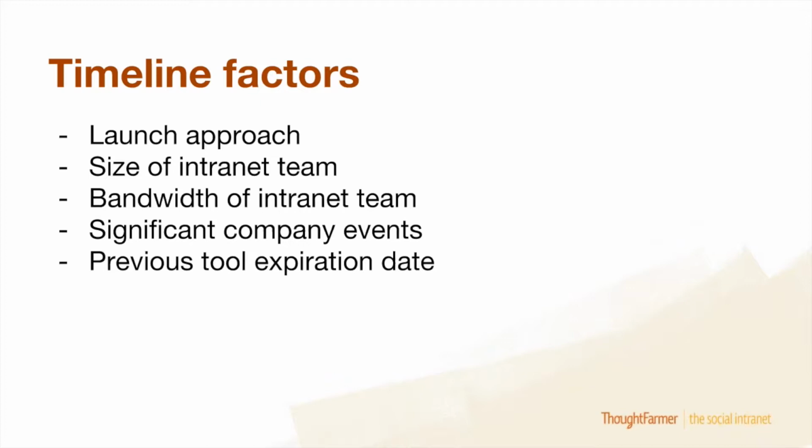And then lastly, and this is pretty obvious, do you have a hard stop date on a previous intranet system, right? For example, if your previous intranet tool, if you had one before, is going to become obsolete on December 31st, then it's pretty obvious that your target date to launch your new intranet will have to be before that time.